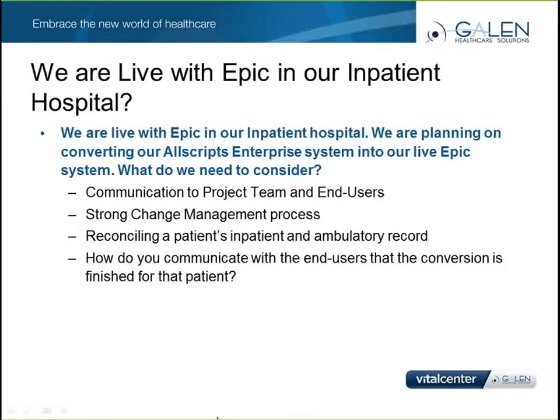Some organizations have made the decision that if allergy information has already been documented in the patient's chart, that it not get overwritten by any conversion data. Those patients get flagged, and the PCP or another delegated provider gets notified on who those patients are and has to decide what information should get added to the chart.